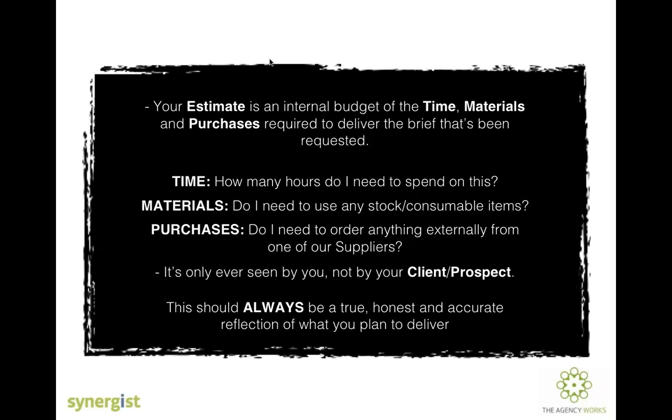If you said an estimated 100 hours of a designer, for example, and they come back and you need to either add value or discount value, the thing not to do is to reduce those hours, because that will put all of your capacity plans out. It will also not give your studio team a realistic vision of what they need to be completing for a particular task within a job.